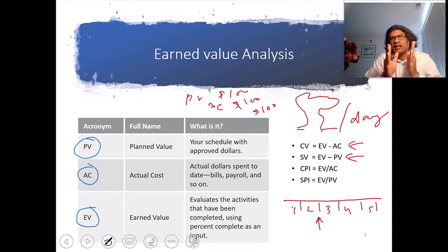So it's an accumulation. Just hear the word accumulation, because earned value is always an accumulated result of the work performed. At the end of the day, in total, this person planted only one tree. First day he planted 1, 0 trees on the second day, so the accumulation is 1. Plan value is how many trees are supposed to be planted by the end of the day: 2.